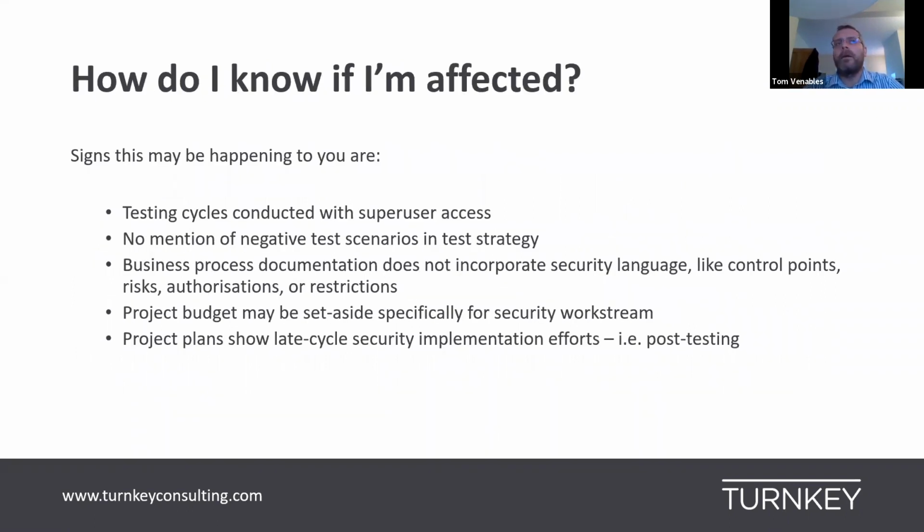Some indicators that you might have fallen foul of this, or might be about to fall foul, depending on where you are in the process: take a look at your test cycles, see what access they're using to test. If you do see super user or massive combinations of roles or SAP all on your test scenario users, then that would be an indicator that you might not have exposed those early enough.